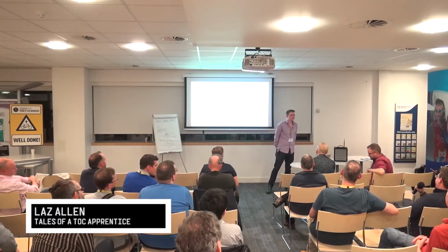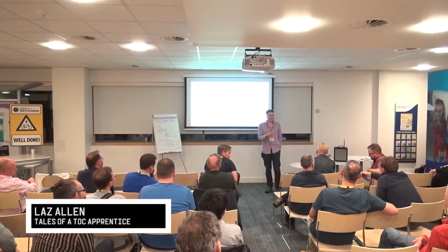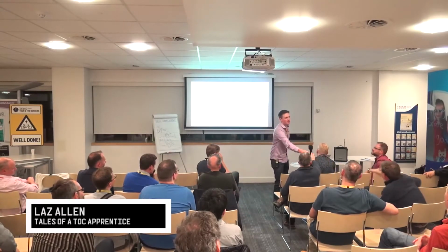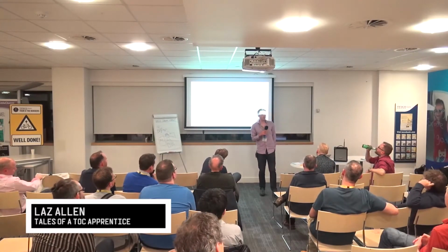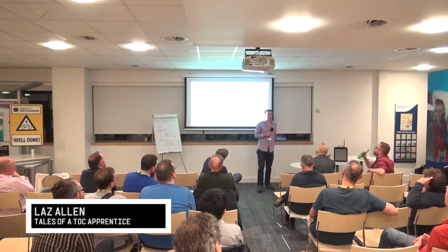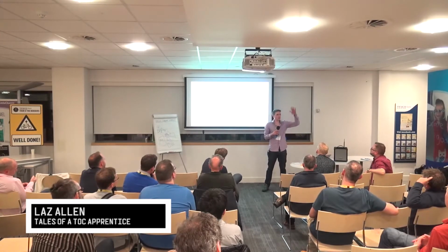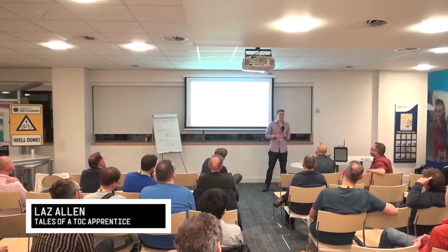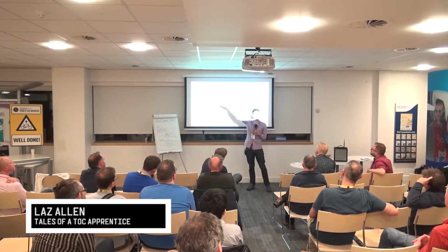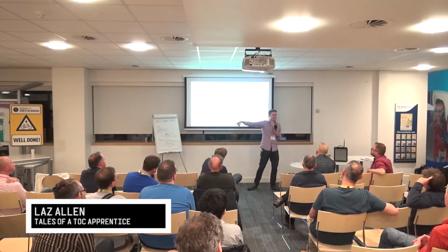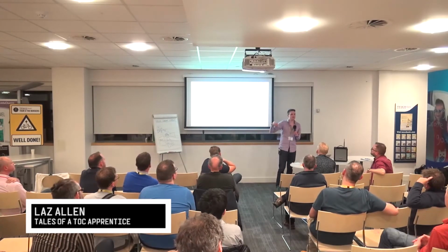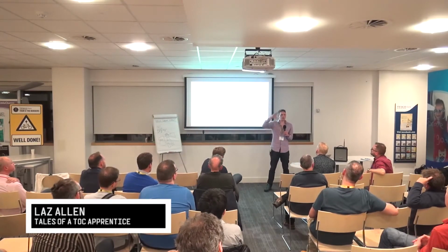Carefully. So having flow metrics in place in our environment helps a lot. If you're using something like Jira, you can look at the amount of stuff in backlogs as it goes up and down. You can look at flow rates and that kind of stuff. In a factory, it's really easy because you walk around, and if someone's got a huge amount of inventory sat in front of their desk, that's where the constraint is, right? We don't quite have that luxury in this industry, so it works a bit differently. So we rely on looking at people's Scrum boards.